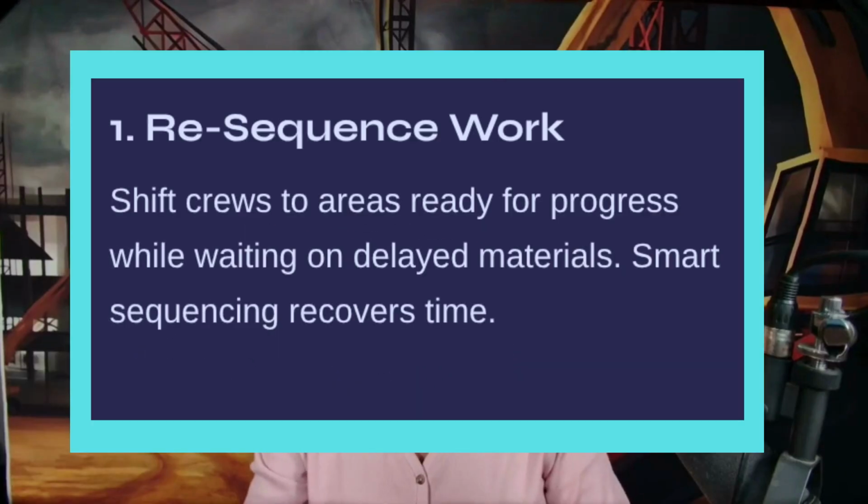Once you know the cause, evaluate your recovery options. And here are some of my go-to strategies. Number 1, resequence the work. If certain areas or floors are ready ahead of others, then shift crews to work where they can make progress while waiting on the delayed materials. You'd be surprised how much time you can recover with smart sequencing.